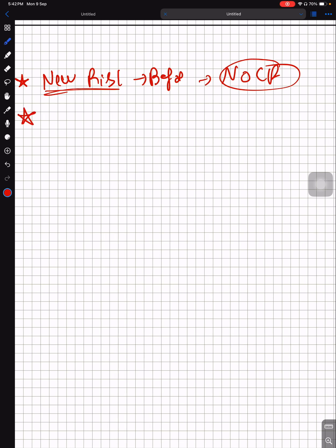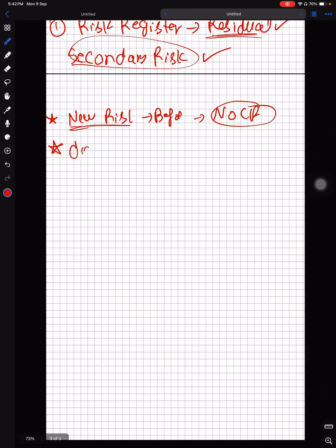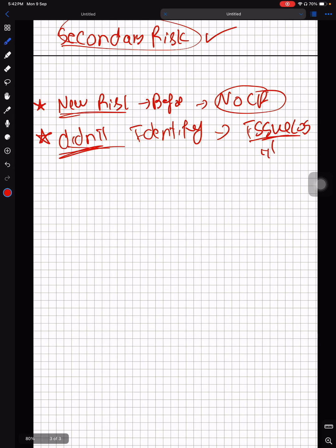Okay, what if something we did not identify and it happened? We did not identify it, and it happened. It has happened, so issue log. So we will identify why this was not identified before. We will raise a CR to handle that issue, and I will tell you how to handle the issue in a minute.